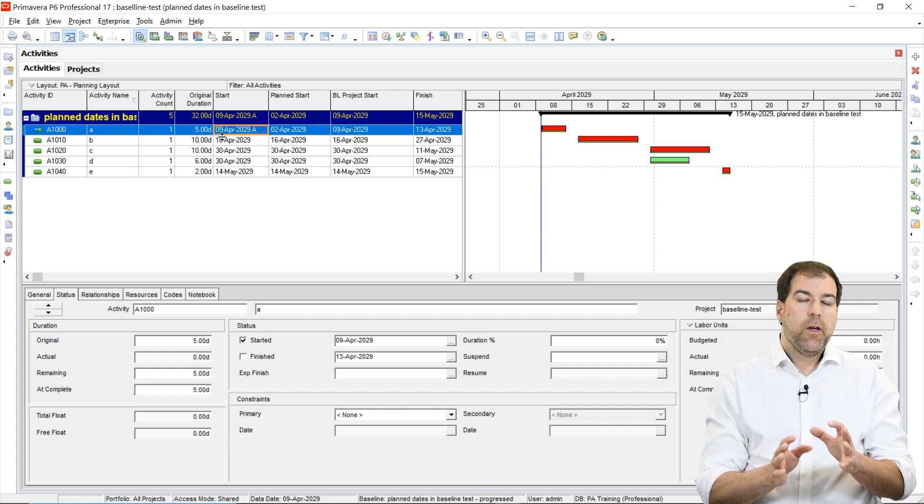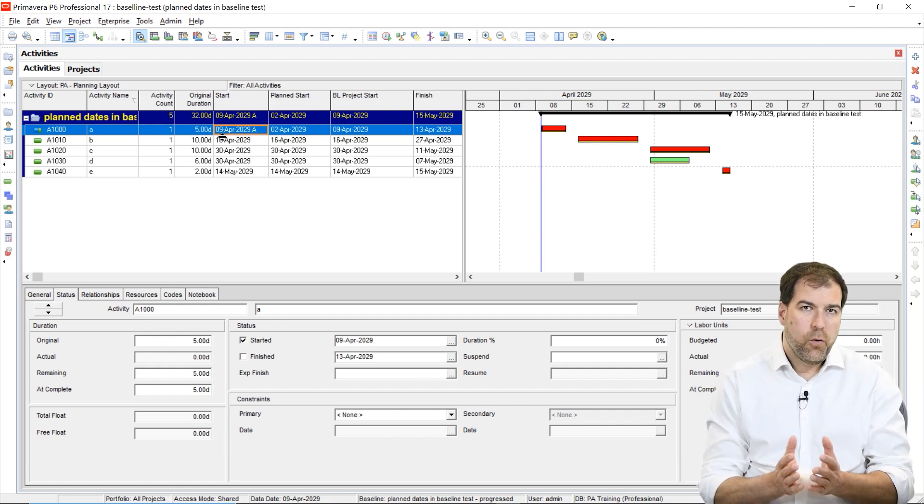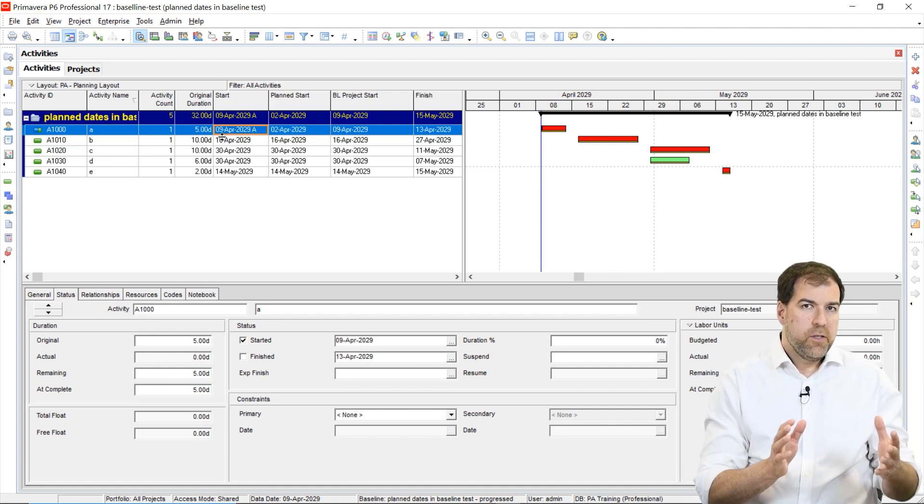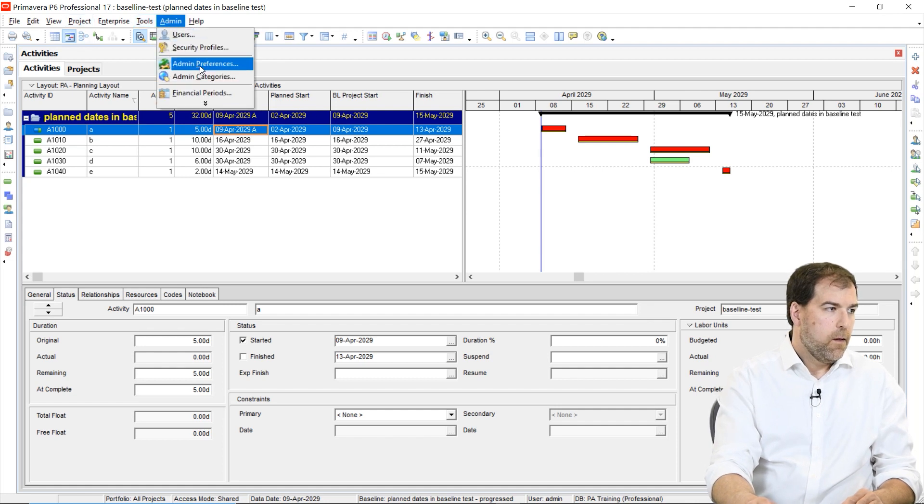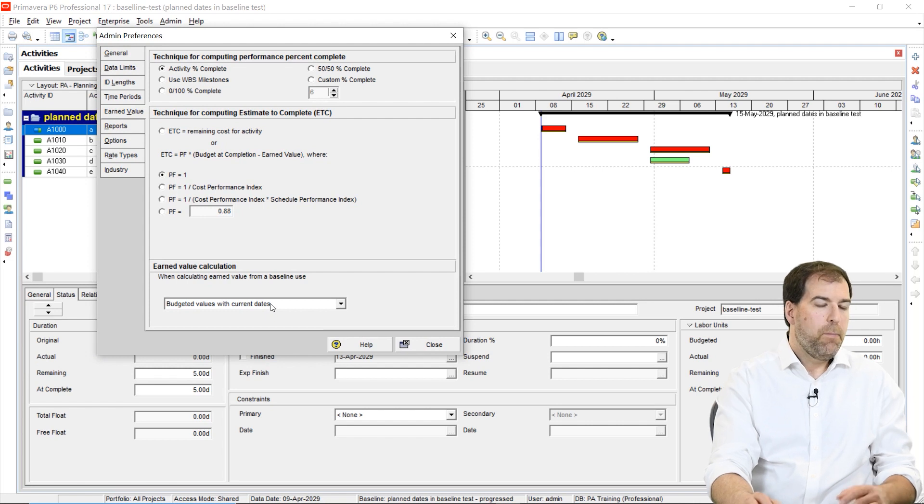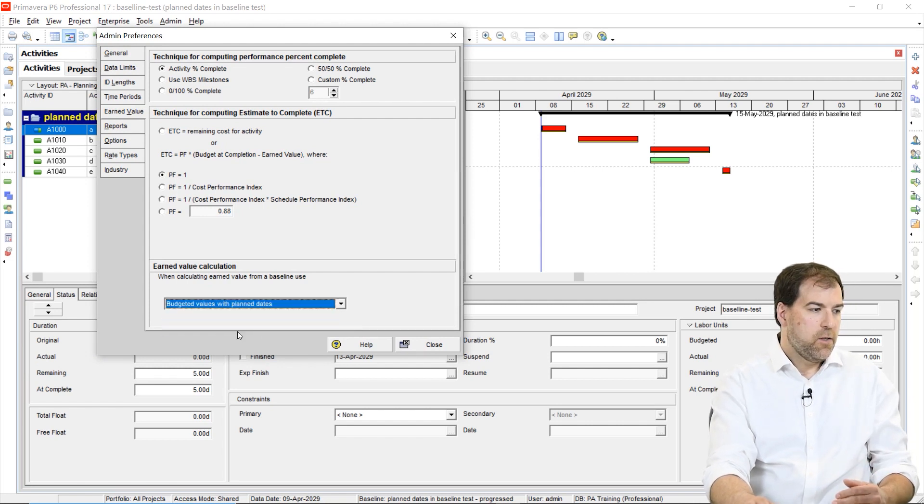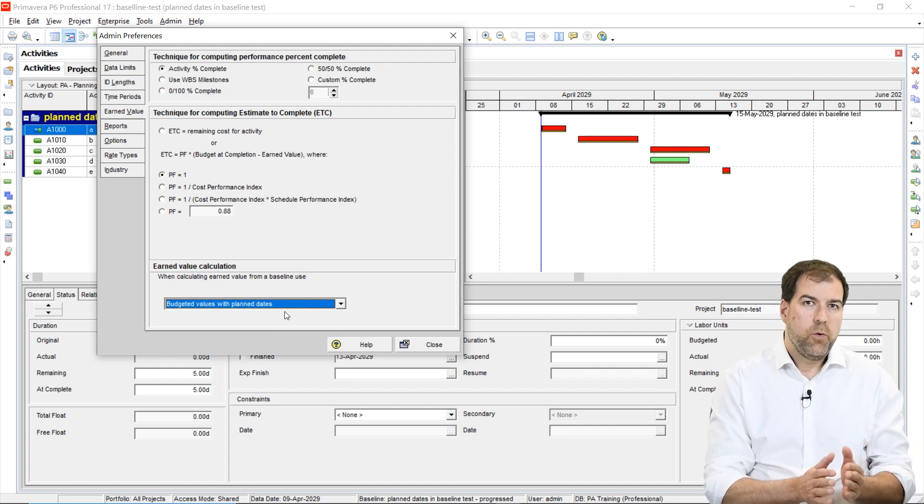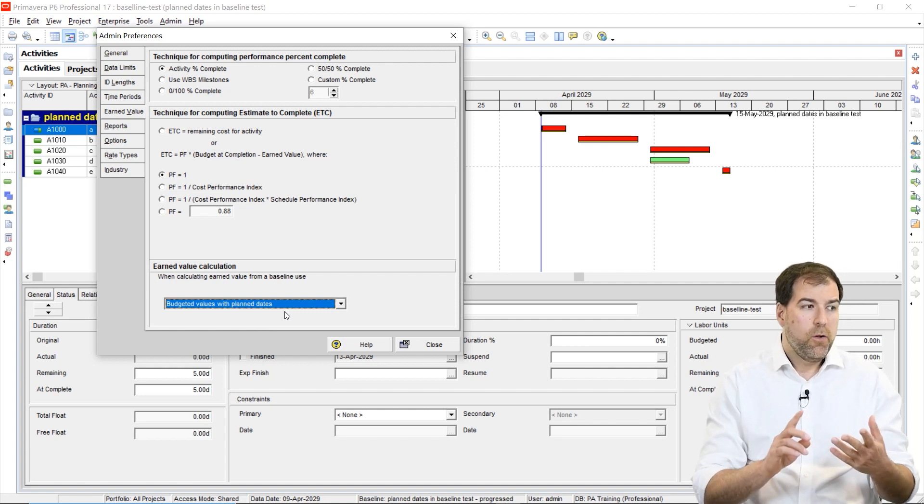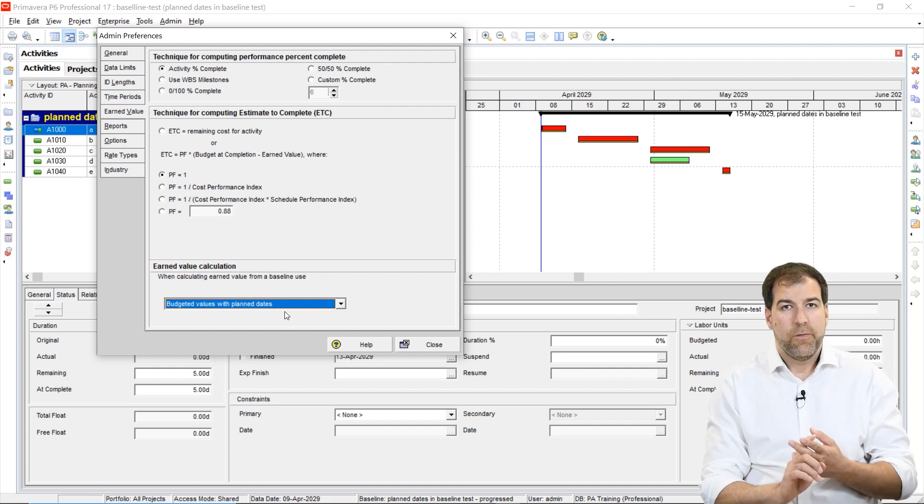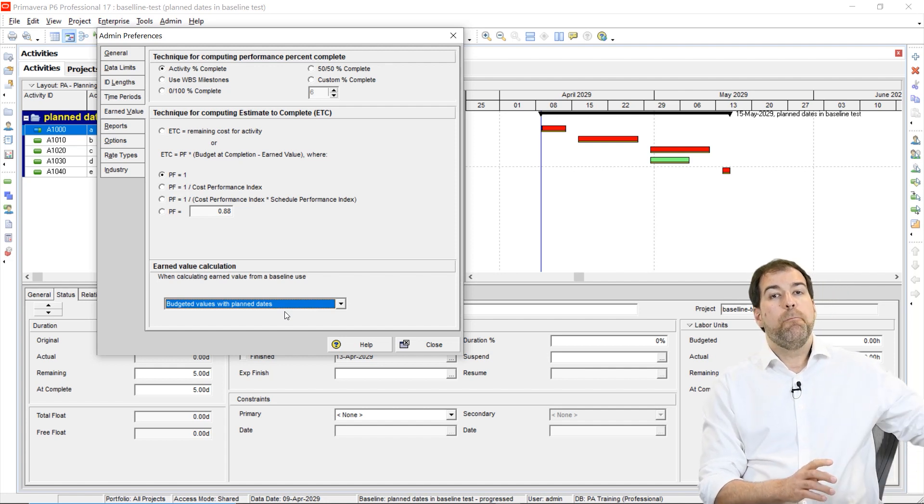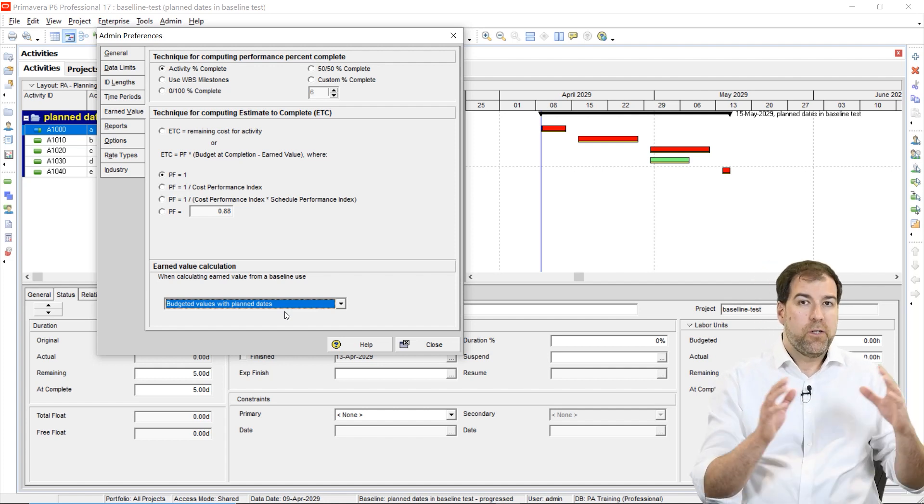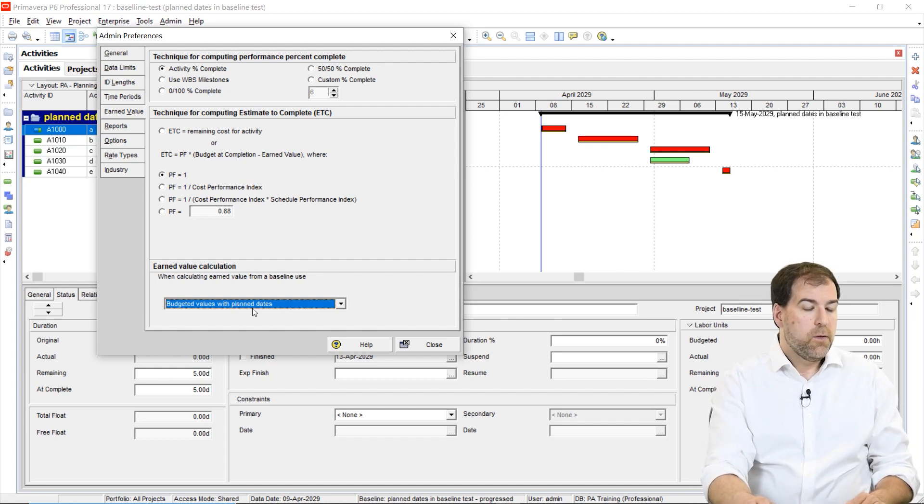So to kind of summarize this whole thing up, this earned value setting under admin preferences here, this earned value setting by default, it is set to plan dates. We don't want that. This will affect your baselines. It will also affect any earned value calculations that are based on those baseline dates, of which there are quite a few.